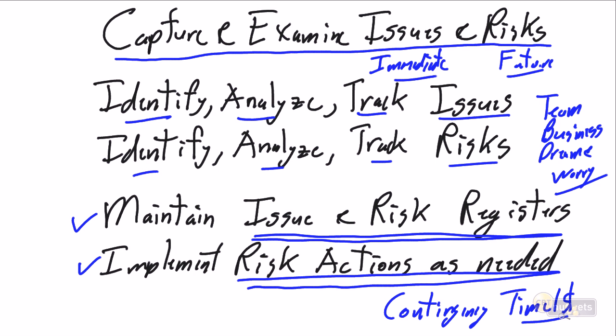Or I built an extra $20,000 into my project budget so I could bring in 2 weeks or 3 weeks, or whatever the appropriate time frame, of a local consultant who is a recognized expert in this programming language, so he or she can coach and support and do whatever they can to help mitigate, to eliminate, to get rid of this risk with the learning curve.